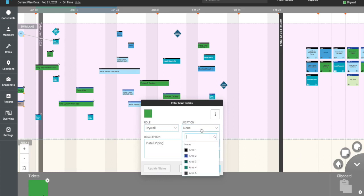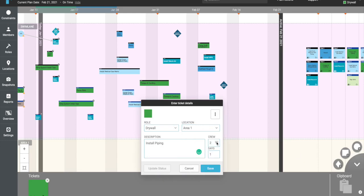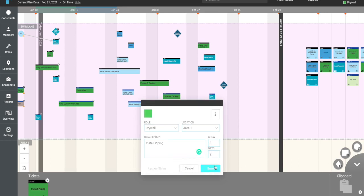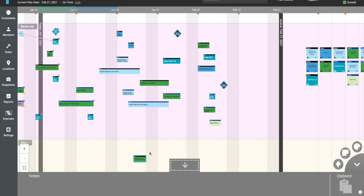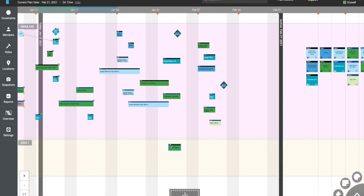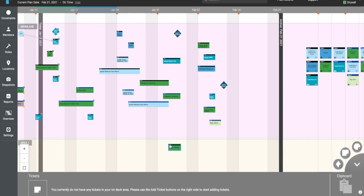After entering ticket details and clicking Save, you'll notice that your ticket goes into a gray bar on the bottom of your screen. We call this the on-deck area. Think of that as your parking lot of tickets prior to placing them up onto the planning board above. When you're ready, click and drag your ticket out of the gray area and place it up on the appropriate date.